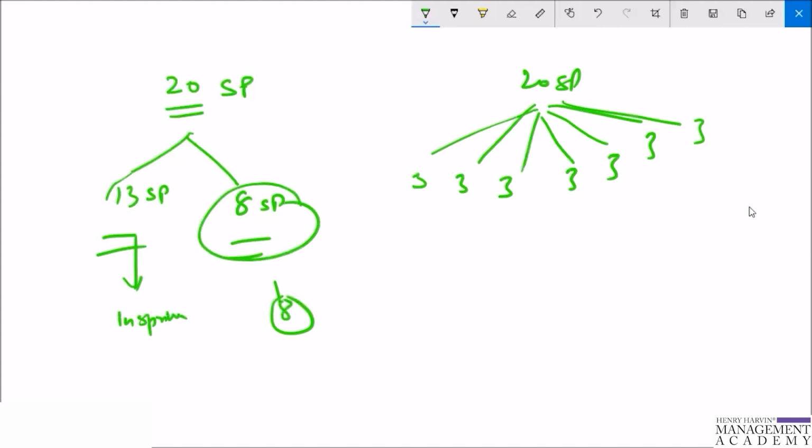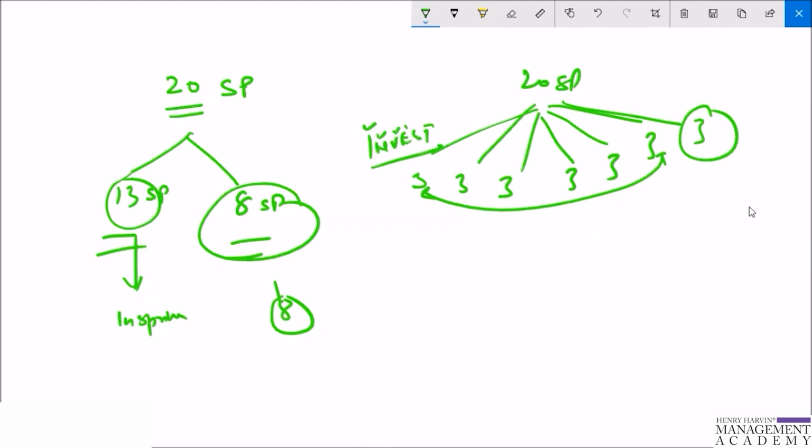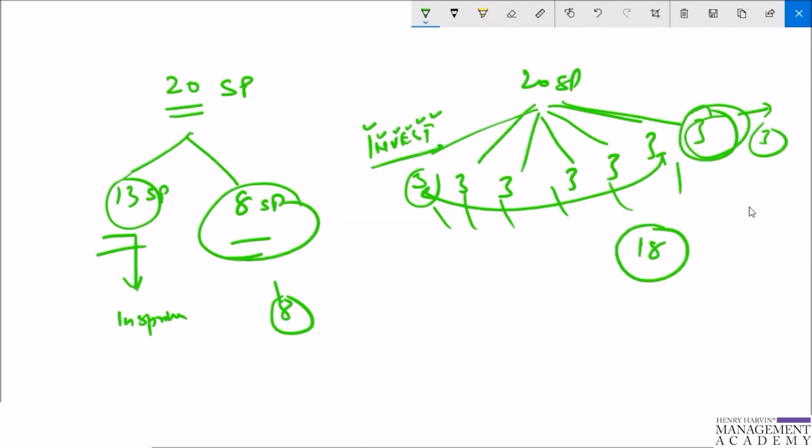If one part of this is not achievable, they are going to achieve all the other parts, provided they hold the INVEST guideline, that is independent, negotiable, valuable, estimable, small, and testable. So they are going to achieve all these things, and only one 3 pointer story will be left in that case. So here the velocity would be 18, and there the velocity would be 8.